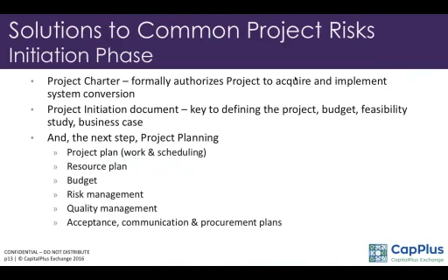How project risk and quality will be managed. Usually there has to be a person assigned for risk management and reporting at each stage of the project, and this has to be regular reporting. How assets will be procured. There will be certain guidelines that you need to put down. How project communication will be effected. This is another thing. Project communication has to be within the organization as well as with the outside. Your clients, maybe the central bank or the regulatory authority, you need to communicate with them.